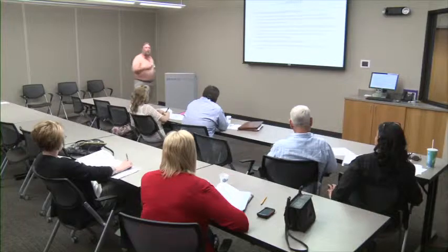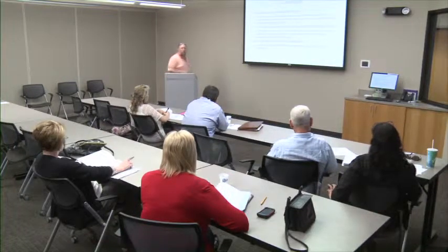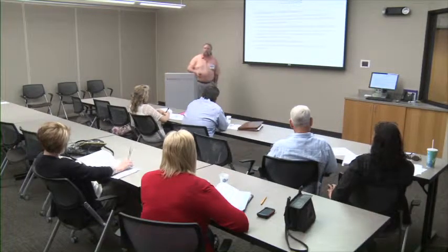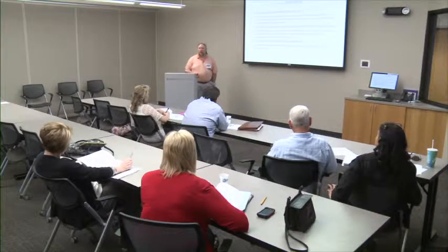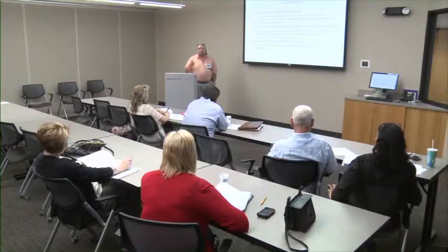So different areas where we work may have different holidays. August 1st in Colorado is a holiday. It's the day the state became a state. So if you go work in Colorado, you're going to get the 1st of August off. So you need to make sure you have the right stuff.